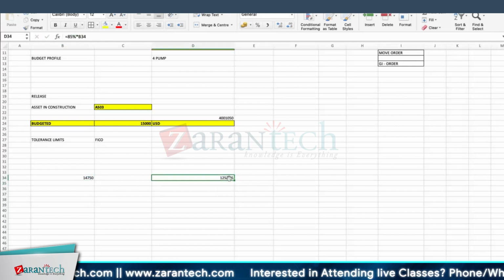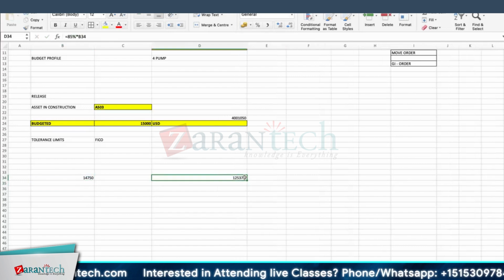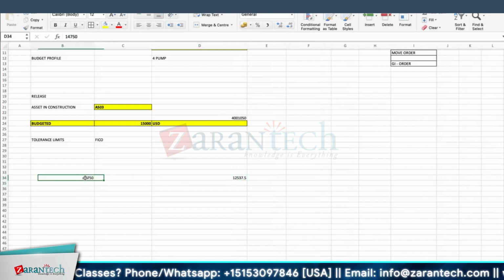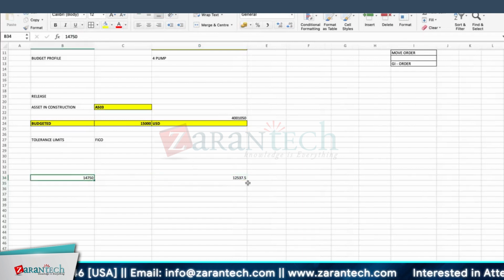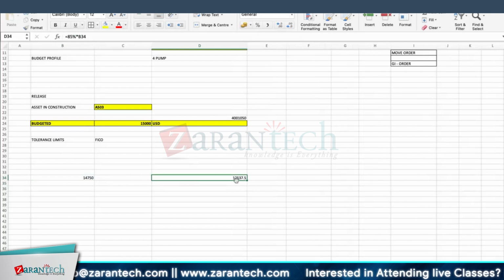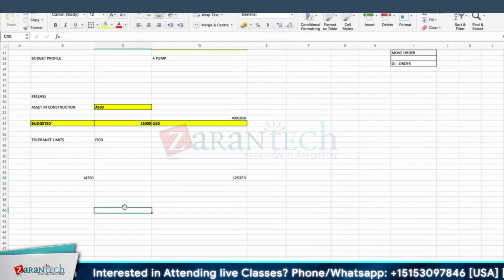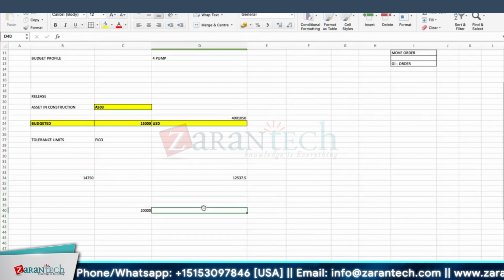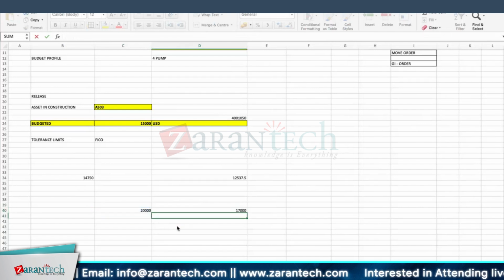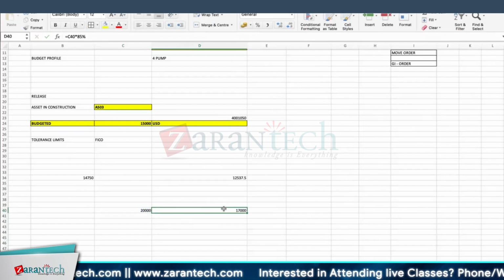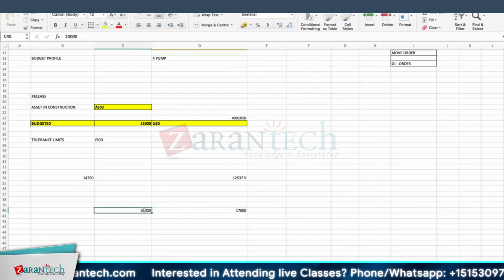Okay, budget is not assigned yet. This one, 12,000. Okay, means 85%. If your total budget is this much, for example, if you reach this 12,537, then it should be an error message. Okay, anyway, we are setting some 20,000 now. We will give a budget of 20,000. Go for this, 20,000 multiplied by 85%. How much? 17,000. Okay, till 17,000 there is a cushion.